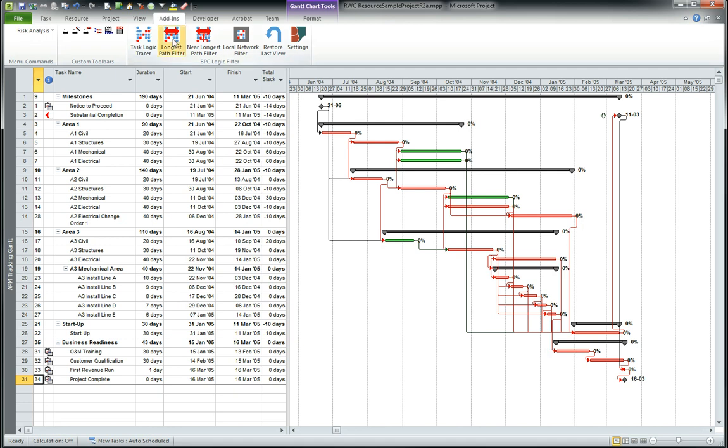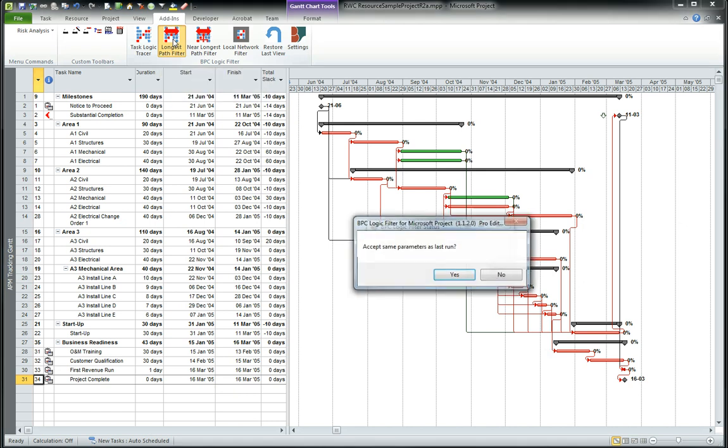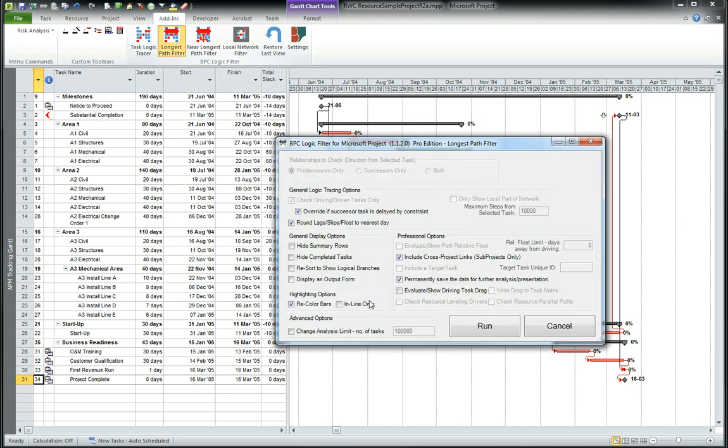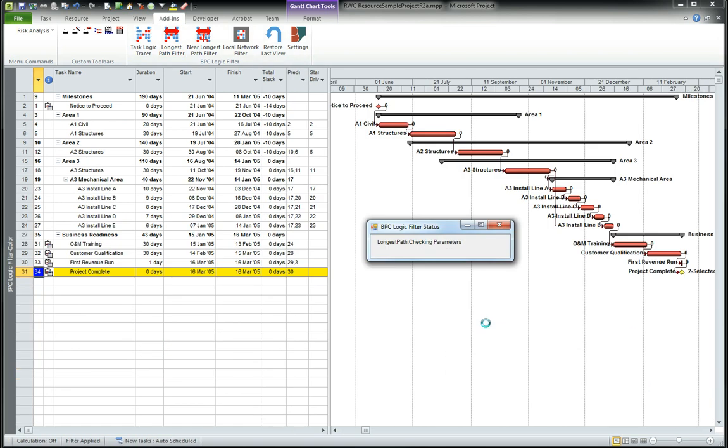So let's just use the longest path filter from BPC logic filter. These are default conditions. We run it.